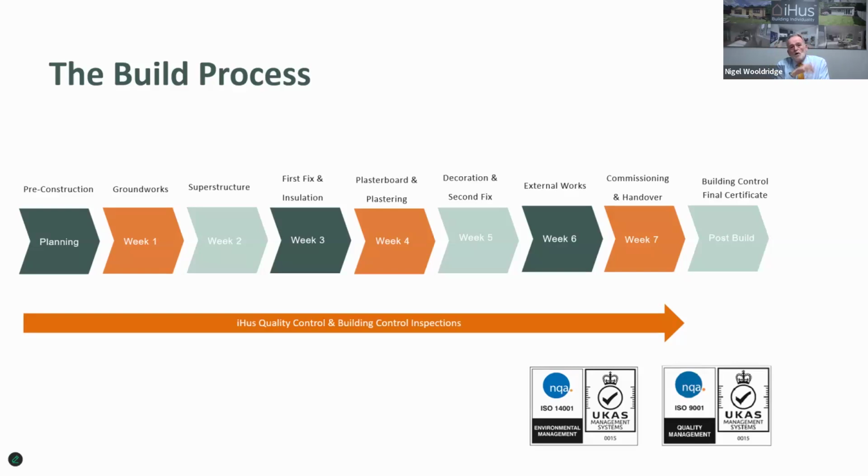Now, it does say 1 to 8 weeks. Yeah. That's depending on the size and dimensions of the annex, of course. We would always say 8 to 12 weeks for build, just in case it's a bigger build or a pitch roof build. Oliver is very, very honest with his 8 to 10 week rule. So we normally say from the day you say, Nigel, that's exactly what I want, it's normally 6 to 7 months and you're moved in. You're actually living in your new home.